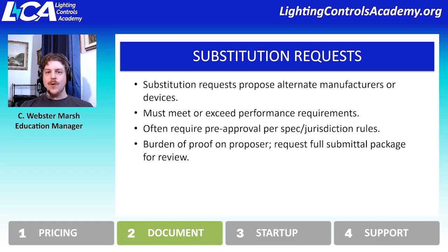And the way that I prefer to have my substitution requests provided is to have a complete submittal package, just as though I were reviewing the system that I had specified for approval. This needs to prove to me that, yes, this is going to work, and a complete submittal package is quite a heavy lift for somebody to provide, hoping that it's going to be a substitution. So in that case, the due diligence really is on the person proposing that substitution.